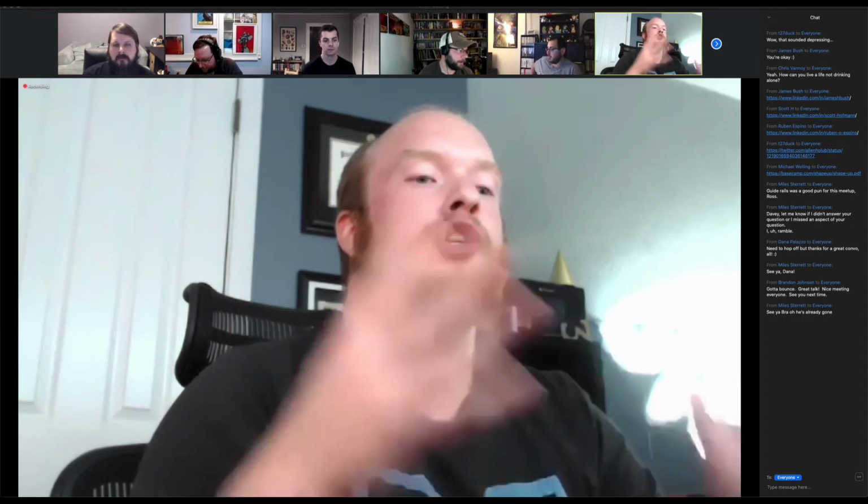There's a section in the back of the book that talks about transitioning into using ShapeUp. And what worked for PackSafe, well, actually, it's not what worked, it's just what we went through: your first couple of cycles are not going to feel right. Maybe you won't have the right amount of work. The real core reason is that you're supposed to be shaping 2 cycles ahead of what you're currently working on.